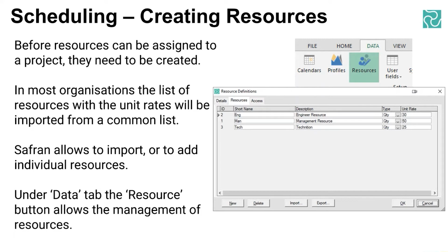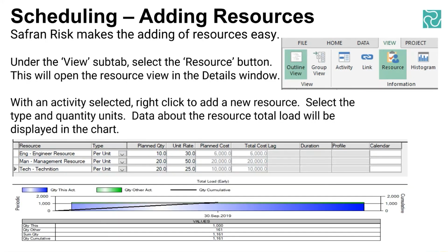That is also easy to do. You can actually change the profile. So if you want to front load or rear end load the incurrence of cost, you can make some adjustments to that as well. So this is all possible to do.